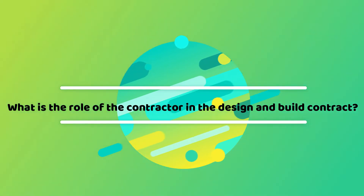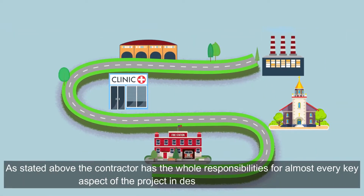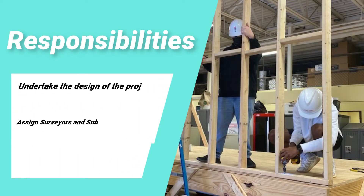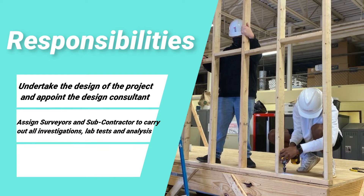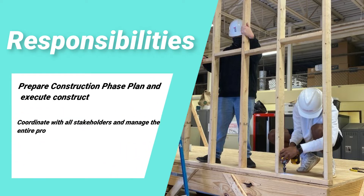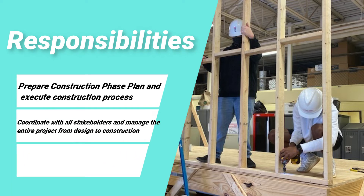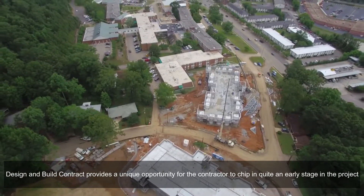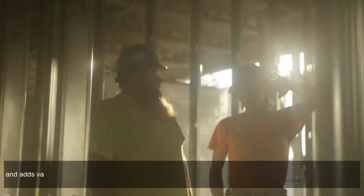What is the role of the contractor in the design and build contract? The contractor has the whole responsibility for almost every key aspect of the project. Key responsibilities include: undertaking the design of the project and appointing the design consultant, surveyors, and subcontractors to carry out all investigations, lab tests, and analysis; preparing the construction phase plan and executing the construction process; and coordinating with all stakeholders and managing the entire project from design to construction.